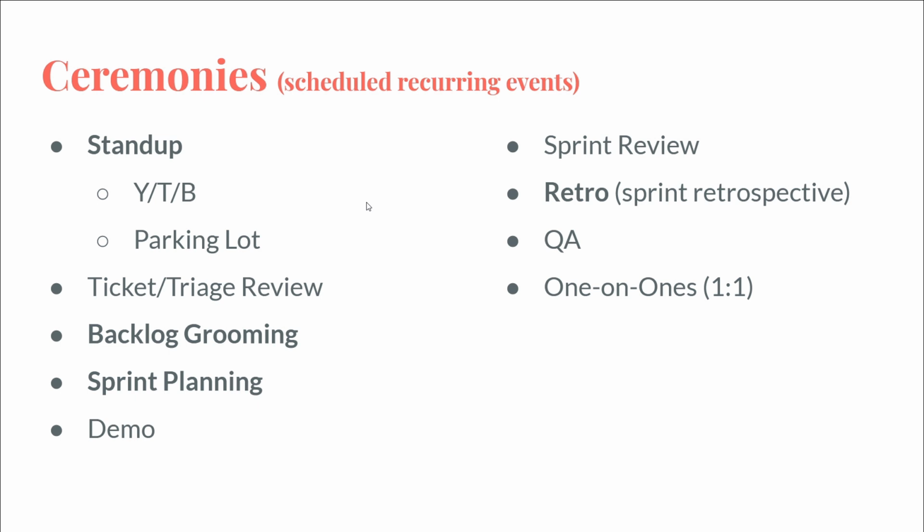the manager or the product owner or the project manager, can that person go through and do the grooming on their own in advance and then only bring the tickets that we need team input on to the team, and maybe take this from a 4 hour process down to 3 hours for one person and 1 hour for everybody else.